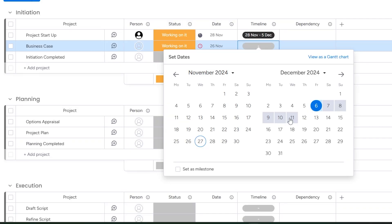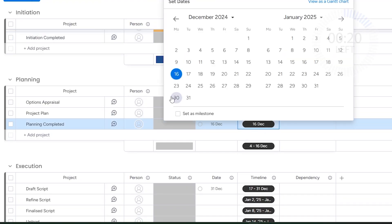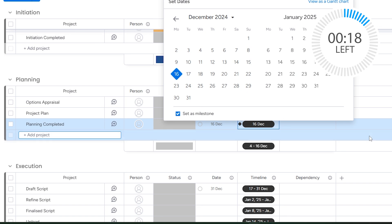When you do this, remember to put dates in the timeline column. Any tasks without dates won't appear in the Gantt chart. If you've entered your tasks and you realise that you missed something out, you can always add it in the 'add project' section and then just drag it to wherever you want it. Some of your tasks may actually be milestones — to set them as such, click on timeline and check the 'set as milestone' checkbox.